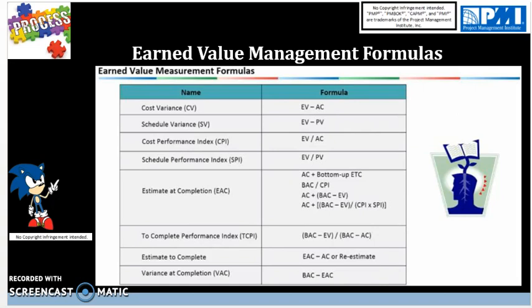So that formula, basically the essence is if the TCPI is less than 1, then you can take it easy. That shows that you are below budget and the project work will be completed under budget. However, if the TCPI is greater than 1, that means the project is out of control and you don't have enough money left to complete the project work that's left for the project. And you need to work aggressively to save costs and be cautious in spending money.